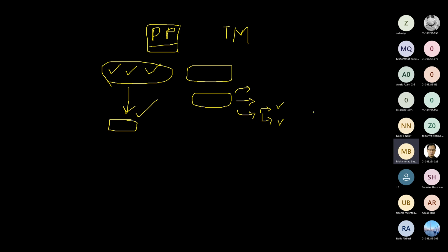Okay, so here, what do we get? We actually get three. We first define the development approach and the project life cycle, and based on that, our planning work starts, and then we start planning the scope. This is what we are studying now, and during planning the scope, the first thing is to prepare a scope management plan and a requirement management plan. Then we perform the next task, and that is collection of the requirements.